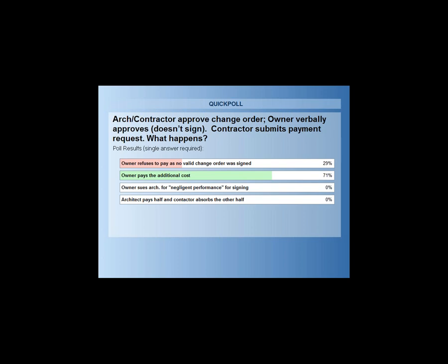I have seen, I could add a fifth one here where the contractor just didn't get paid for the work. I had a project with the state construction office that closed out. The contractor signed all the final documents and turned them in, and some weeks afterwards realized that there was a change that the architect and owner and contractor had agreed to, but it wasn't formally documented and it wasn't forwarded for signature.